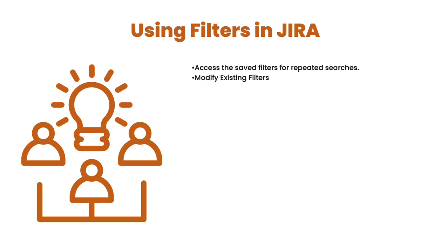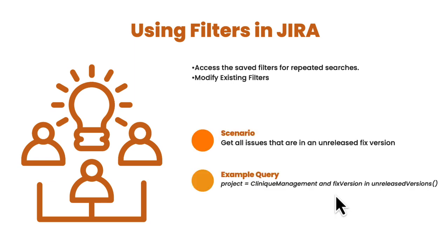These are the issues which we want to see over and over again. For example, get all the issues that are in an unreleased fixed version, that is, which are part of a release but not released yet. That is, I want to get only those issues that are in an unreleased version.